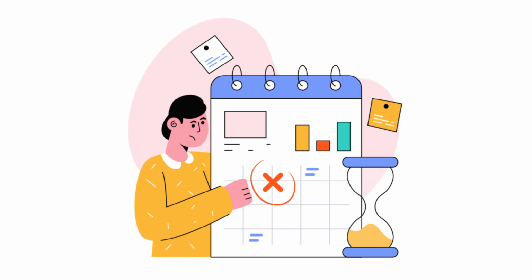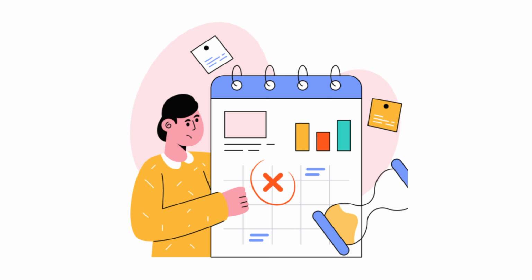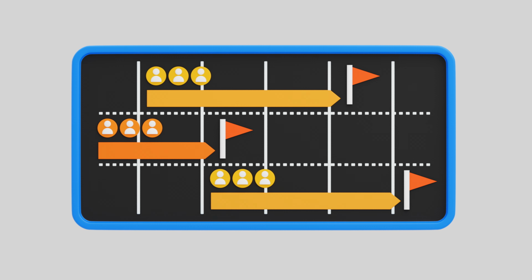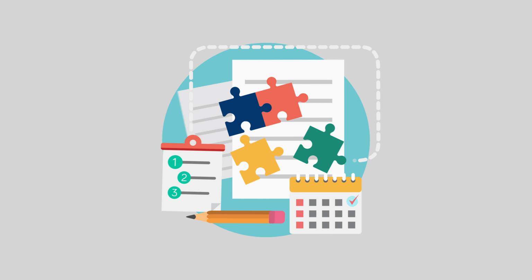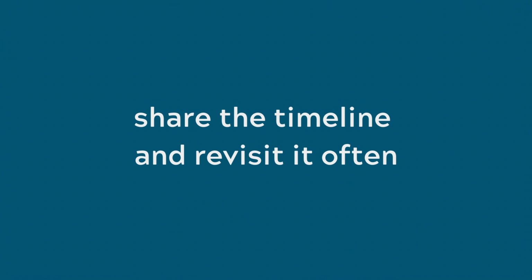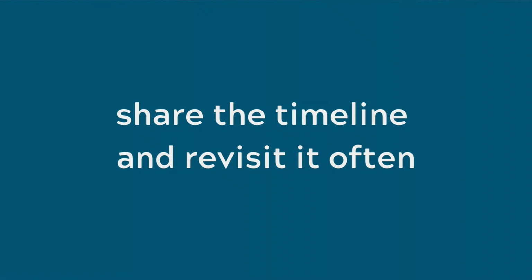Once you have your time estimates, you can work backward from key deadlines. If your project has a hard due date, like the start of a semester or a grant submission, work backward from that date. Identify what must be done before your deadline. Layer in earlier milestones and prep time. Make sure dependencies are accounted for. This helps you to see if your plan is actually feasible and where you may need to adjust scope or shift resources.